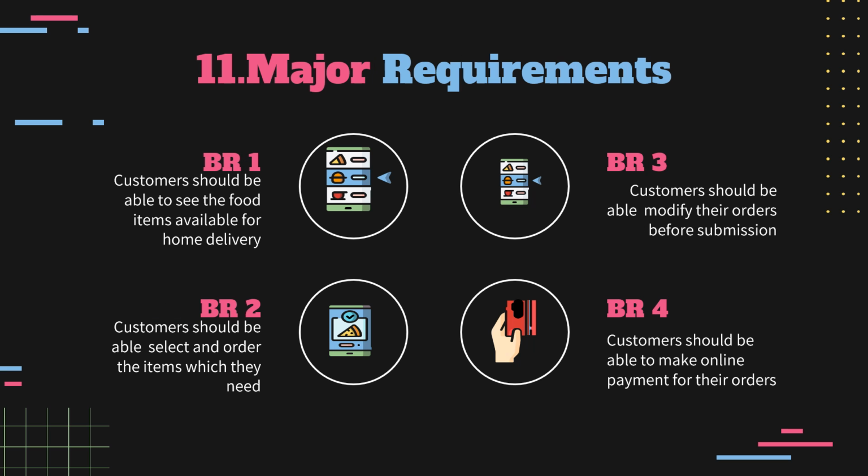Section 11, Major Requirements. The list of requirements will be the most significant part of your document, so split this into sections and headings if you can. Be sure to include the priority when outlining each requirement. That will help the project planning later on in case the project manager splits the work into project milestones. It will also help prioritize the work order if there are resourcing conflicts.